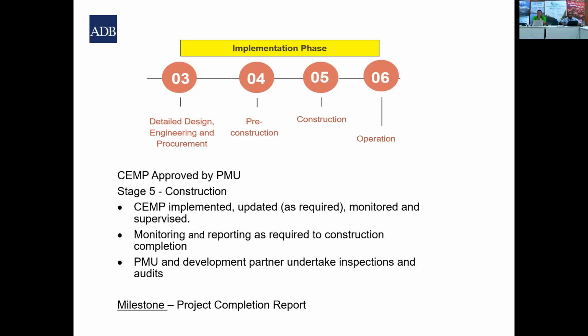Yeah, thanks, Alan. For the EIA regulators that are joining in, let me try to contextualize that for you. When you develop the terms of reference for a consultant to develop the EIA report, when you receive the EIA report with the EMP, you review the report against the terms of reference, and then you will determine after you've added your comments and your conditions have been shaped up.